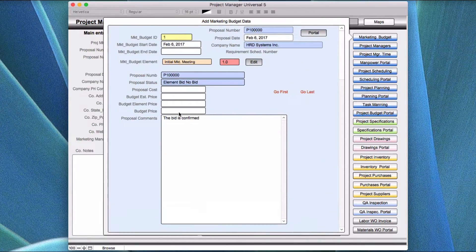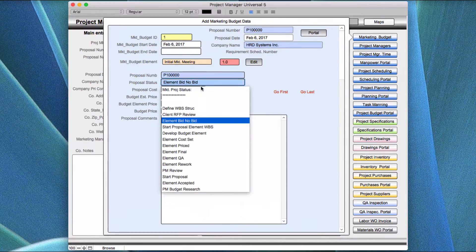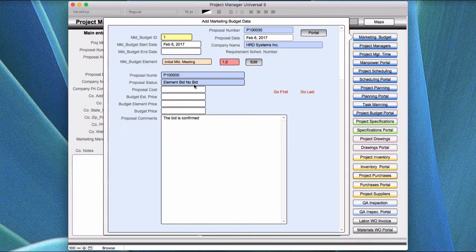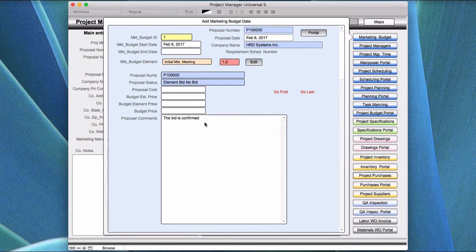One issue you may run into is an element called 'bid no bid.' This is a dropdown with all the different kinds of elements you might be working through. Bid no bid is a situation — for example, say we're doing civil engineering and we have a client that wants the proposal to include certain things, but he did not estimate that there was going to be any survey work done. You start going down through the budget elements and put in a proposal comment saying the client did not include a bid for the survey, which can be disruptive to the whole process, but you need to identify these things.